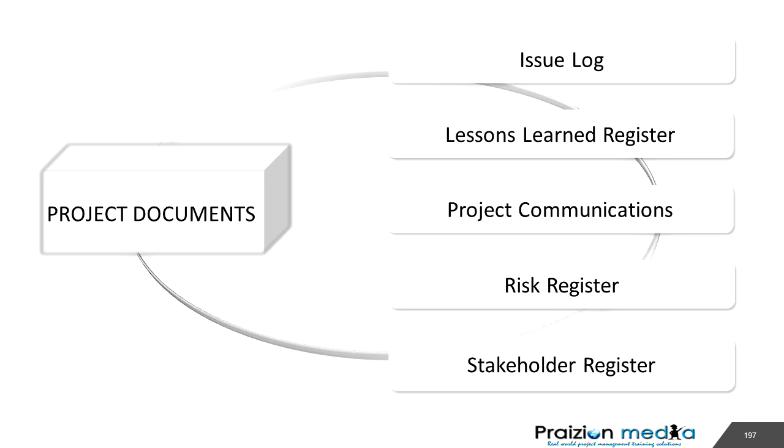What we're trying to do is to establish if our stakeholder engagement plan is working. Okay, so lessons learned from previous phases, from earlier on in the project, could help here. From lessons learned, we might be able to see that a plan is not working.